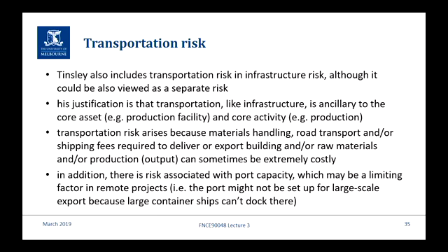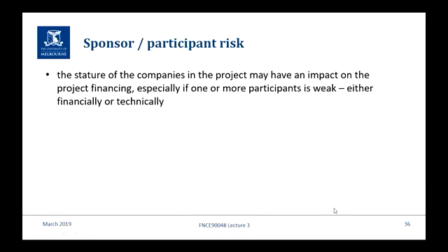You could put some on trucks and drive it around, but it depends on where you are and where you want it to go to. You're not going to put it on aeroplanes, so you really have to use shipping. So if you're going to do a large-scale project in a fairly remote area, the port that's available might not have the capacity to bring in the tankers of the size that you need, for example. Okay, so that's a risk that relates to the construction period.